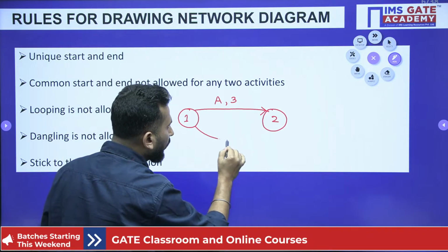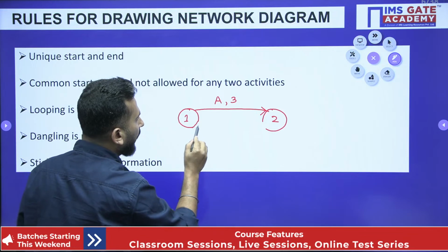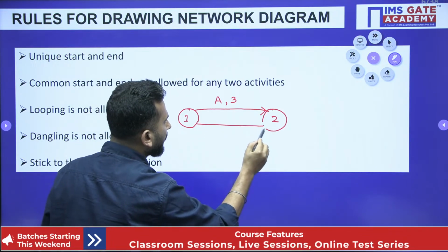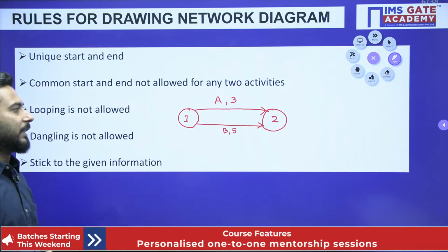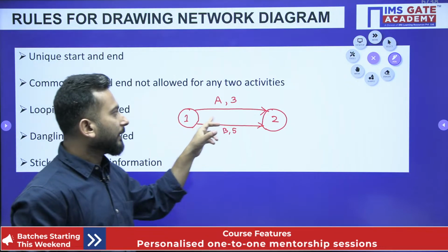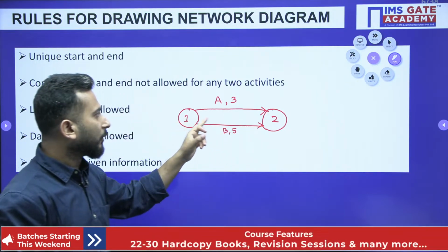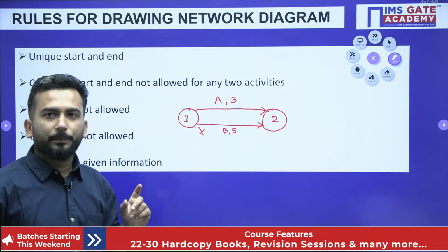Now you cannot draw an activity B, which is taking some time to get completed, having a common start and common end. This is not allowed.